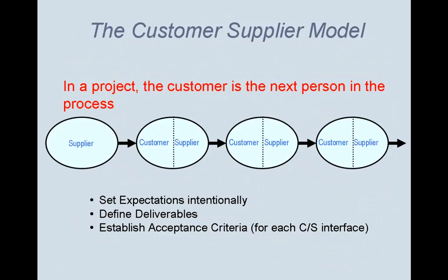Right, you have to define who your customer is, and if you look into any of the literature on doing a needs analysis, there are a couple of things that you do up front. One is that in any organization, part of that process is to define what it is you actually deliver. What products or services do you actually deliver? Secondly, you have to ask the question of those deliverables or products or services, who uses them? That helps you create an understanding of who actually the customers are. It takes a bit of time to do, but it's very worthwhile because then you get to see exactly what it is that you produce at very different levels and who the real customers are and what they're looking for.